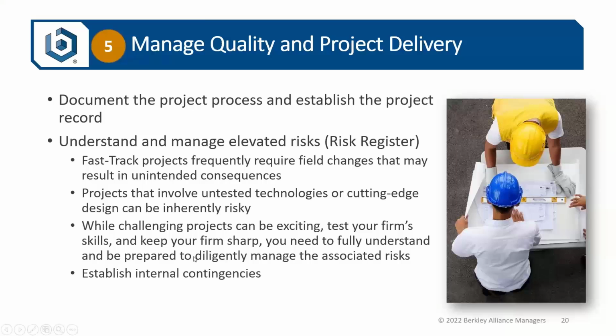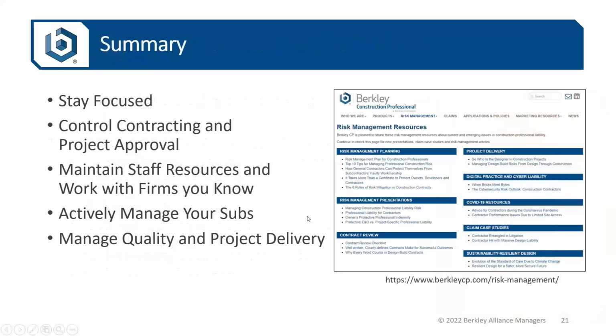I think one of the things you'll need to do is establish internal contingencies to deal with cost elements that you will not be able to recover from an owner as a change order. So that's your business in terms of the way you're managing your construction budgets, managing contingencies that are included in construction management project delivery types. Who has got control of the contingencies? Does the owner have a contingency? Do you, as the contractor or CM, have a contingency? It's got to be proactively managed.